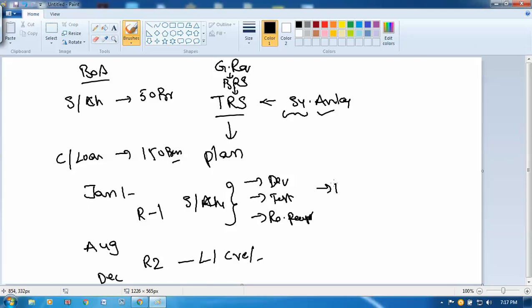What is the budget? How many hours is the client giving? According to the budget, how many senior level, mid level and low level developers, and mid level, high level testers and leads? According to the budget, I can calculate how many hours it will take. According to that, I will recruit the persons and start my work.